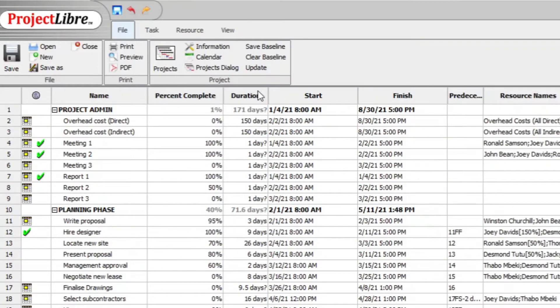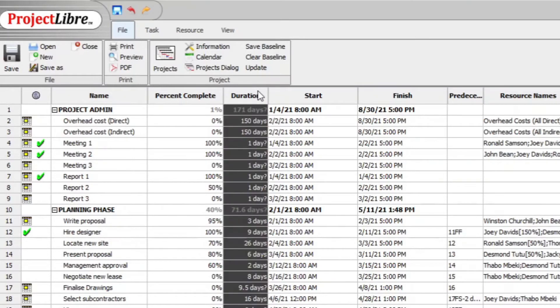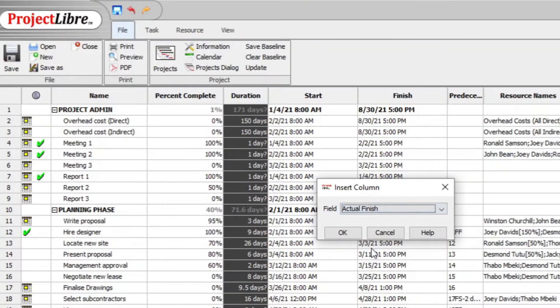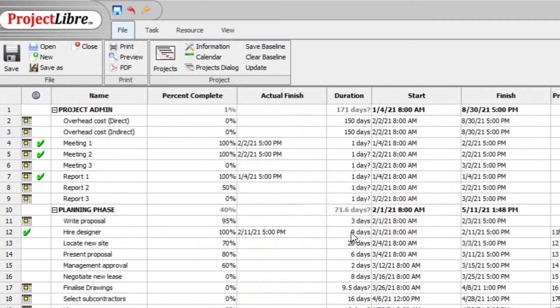You can also, if you want to, insert the column date when it was completed, actual finish. And there you then have when it was finished as well as the date.